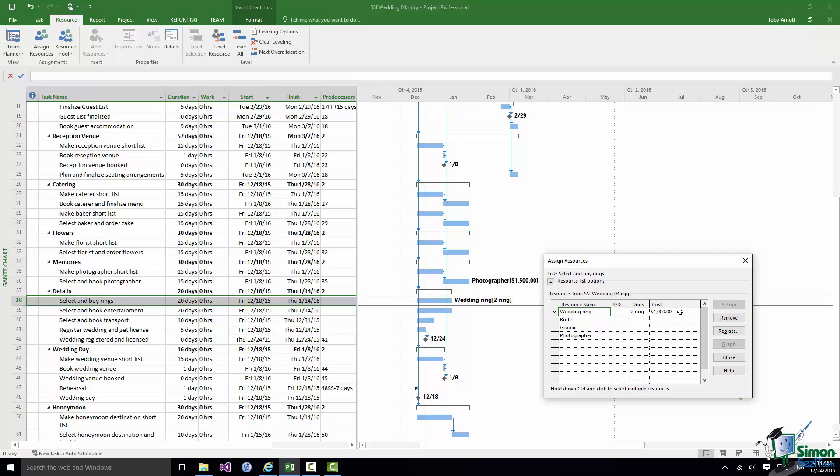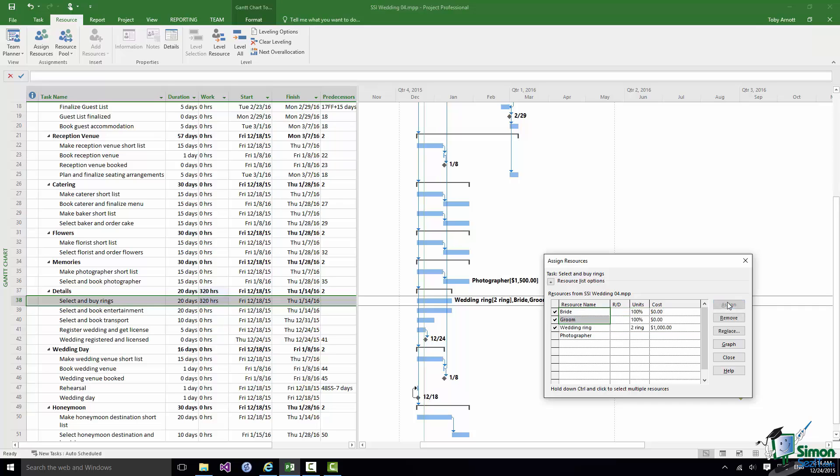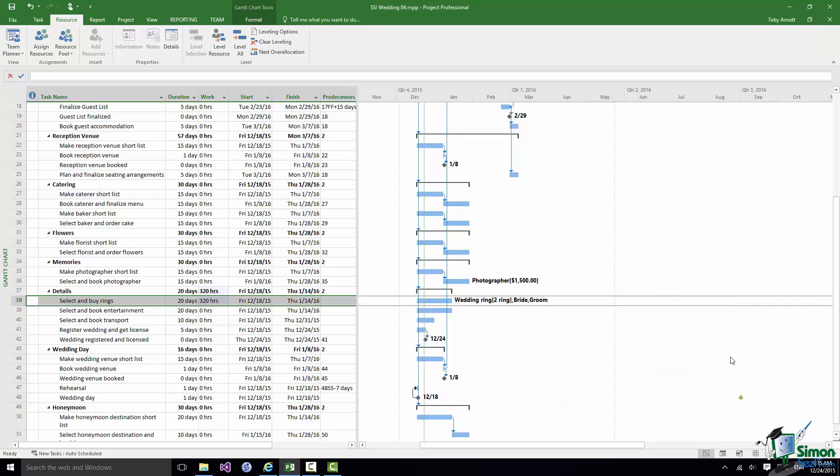The other important thing to bear in mind here is that I could at the same time assign the Bride and Groom to this task as well. So if I select Bride, hold the Control key down, select Groom, click on Assign and now click on Close I've got three resources assigned to that task. I've got the Bride and Groom work resources and Material resource, two wedding rings and note the units there, two ring.